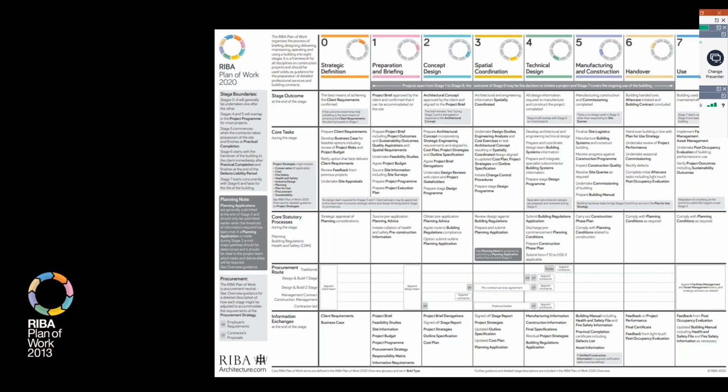I think there's been a lot of confusion around how prescriptive and descriptive work with different forms of procurement. So what I would say, Stephen, is let me give you a couple of examples. I could have a traditional project where the client actually wants to have a number of elements be designed by the contractor rather than the design team. So I have to make those descriptive in what I issue as a design team. And of course, then when the contractor is appointed, the contractor design portion is used for the contractor to do that design work. So I've taken a traditional contract and I've, say, put in a number of elements of design to be undertaken by the contractor.